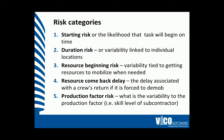There are five categories of risk that we'll assess in our Monte Carlo risk simulation. Number one is the starting risk, or the likelihood that a task will begin on time. Number two is the duration risk, or the variability of that duration linked to the individual location. Number three is the resource beginning risk, or the variability tied to getting resources mobilized when needed to begin that task.